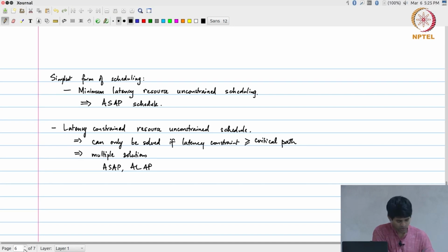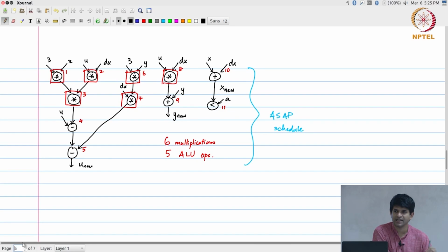Okay. How do I go about doing it? If I go back and look at this graph that I have over here, all that I need to do is basically look at the nodes in some kind of order. What order is that? I essentially look at the critical path, find the ones that are earliest in that critical path, and then go further down from them all the way down to the last task. Okay. So, that ordering is all that I really need to take care of as far as any one of these schedules is concerned, right. Can I build that order systematically for a graph?